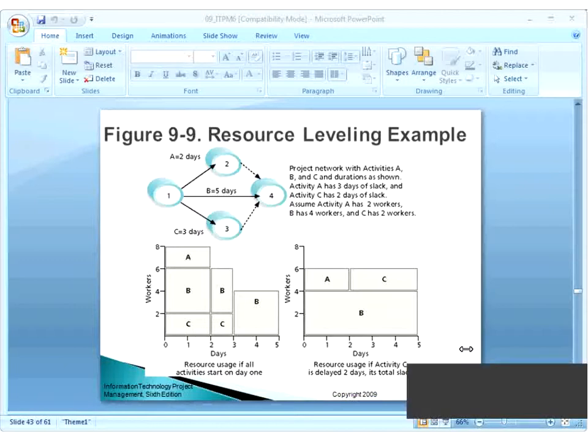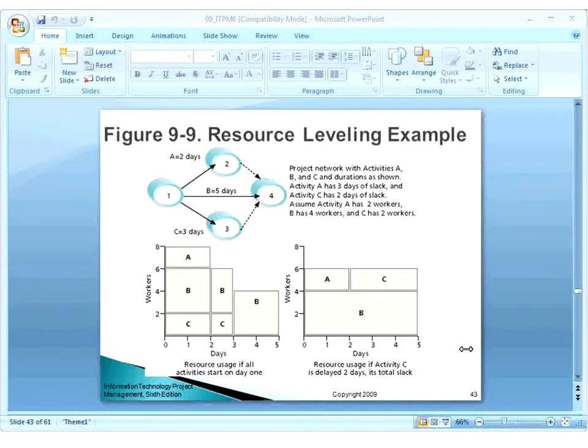I think your question was about over-allocation. It means when you have assigned more workers to a task than you have available. For example, you have 4 workers, but the activity required 8 workers, so you have assigned 8 workers, where you know that you don't have 8 workers.